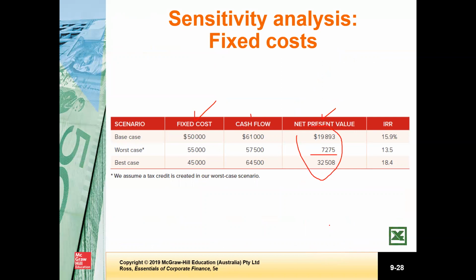Am I right? As we understand, sensitivity analysis is useful for pinpointing those variables that deserve the most attention. If we find that our estimated NPV is especially sensitive to a variable that is difficult to forecast, the degree of forecasting risk is high. We might decide that further market research would be a good idea in this case.